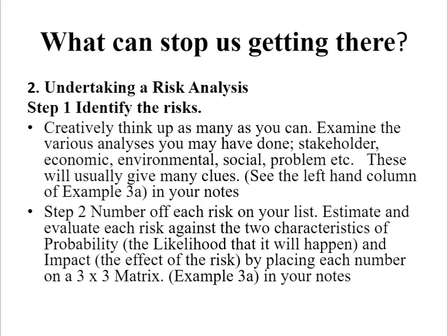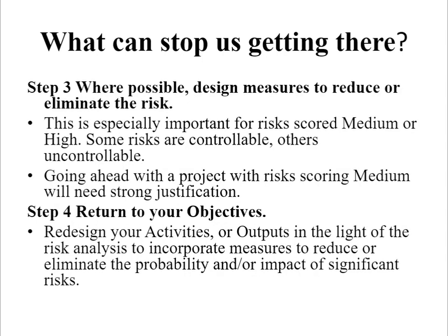The second step is to number off each risk on your list. Estimate and evaluate each risk against the two characteristics of probability, that is, the likelihood that it will happen, and impact, or the effect of the risk.